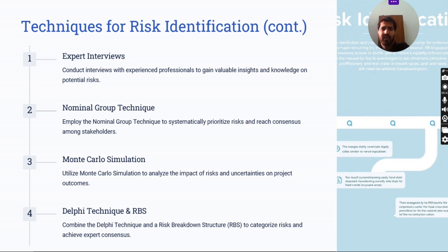The next one is Delphi technique. What is Delphi technique? This approach involves structured interactions among a panel of subject matter experts. Experts are asked to respond to questions over multiple rounds, guided by a preset stopping criteria.